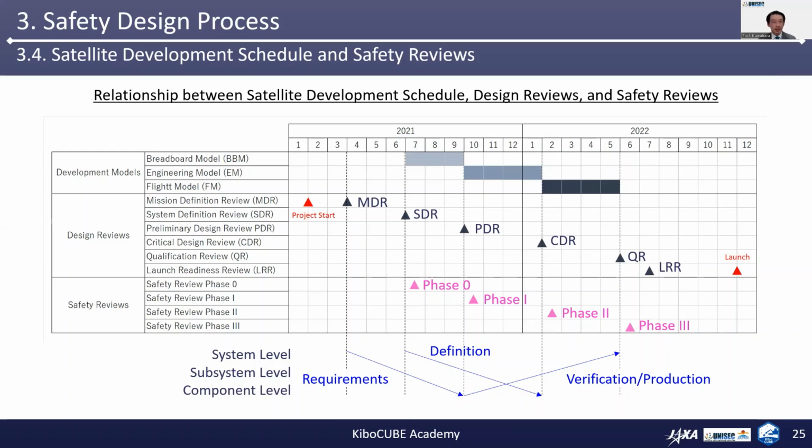After the project initiation, design reviews such as MDR, SDR, PDR, CDR, QR, LRR are placed before the launch. Here, the definition of the names of the reviews depends on each organization's custom. For example, the qualification review is sometimes known as a post-qualification review, or PQR, and the launch readiness review, or LRR, is sometimes known as a pre-shipment review, such as PSR, etc.